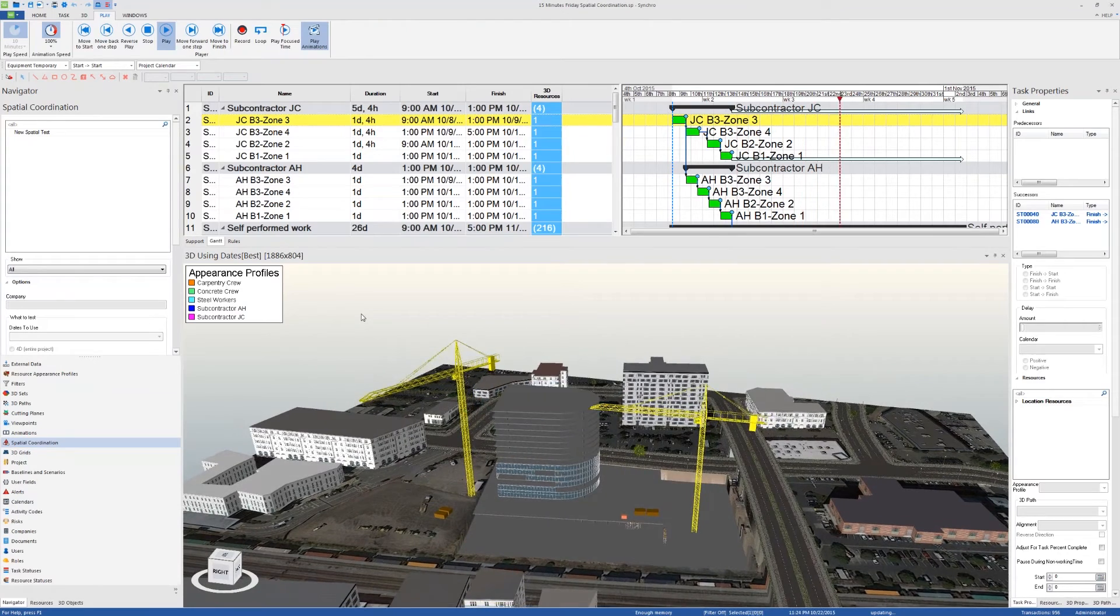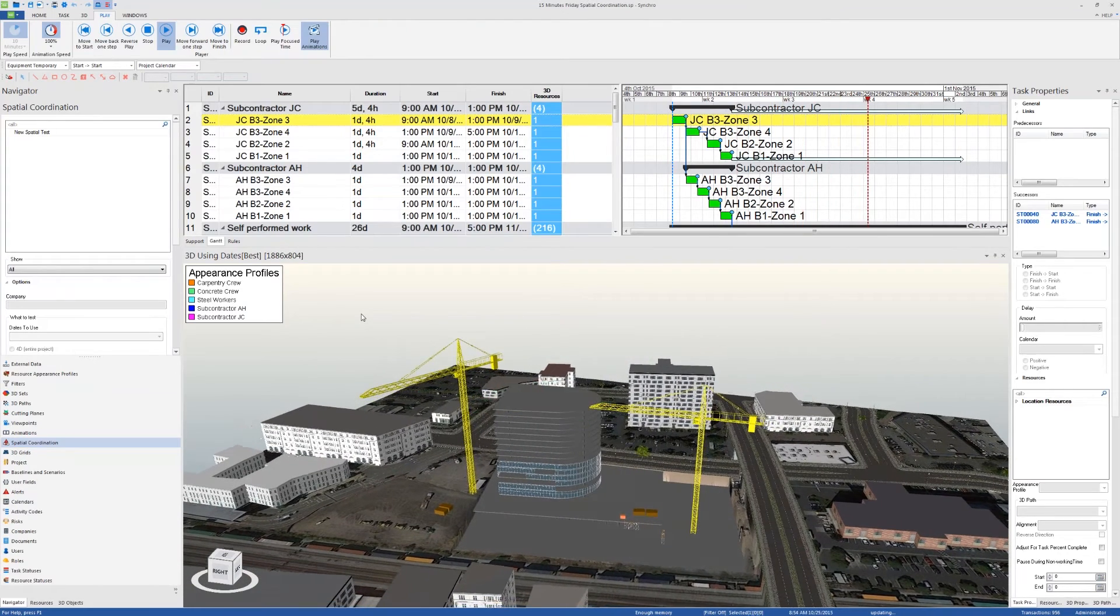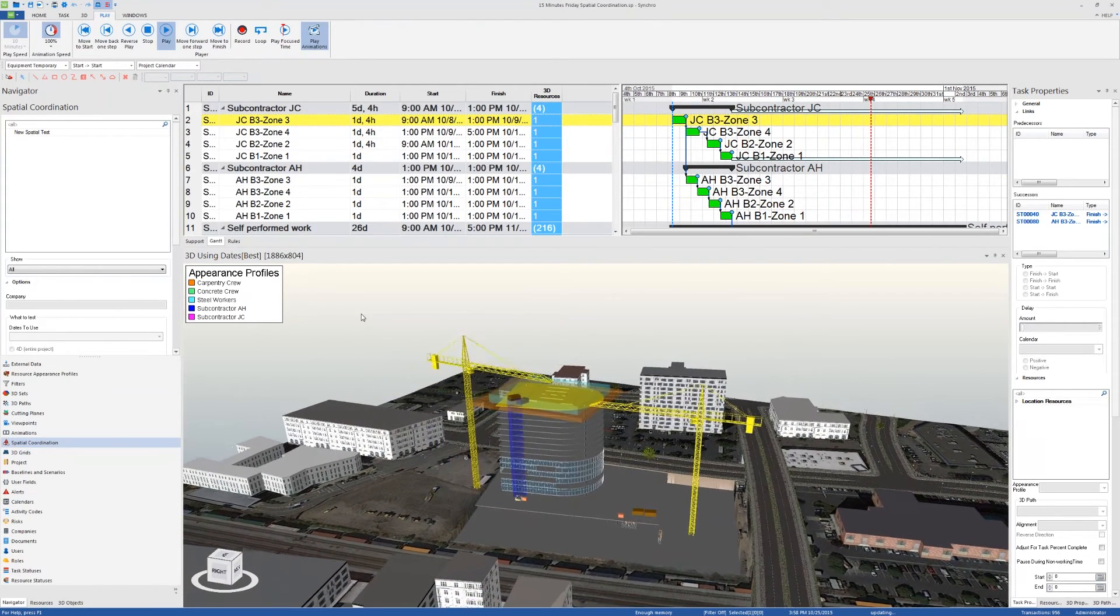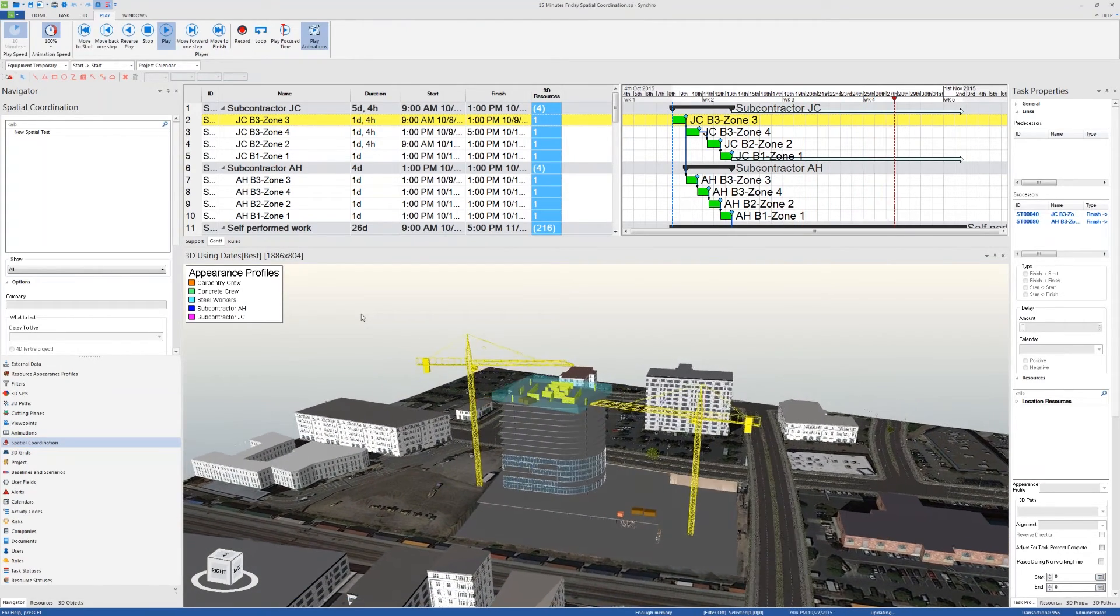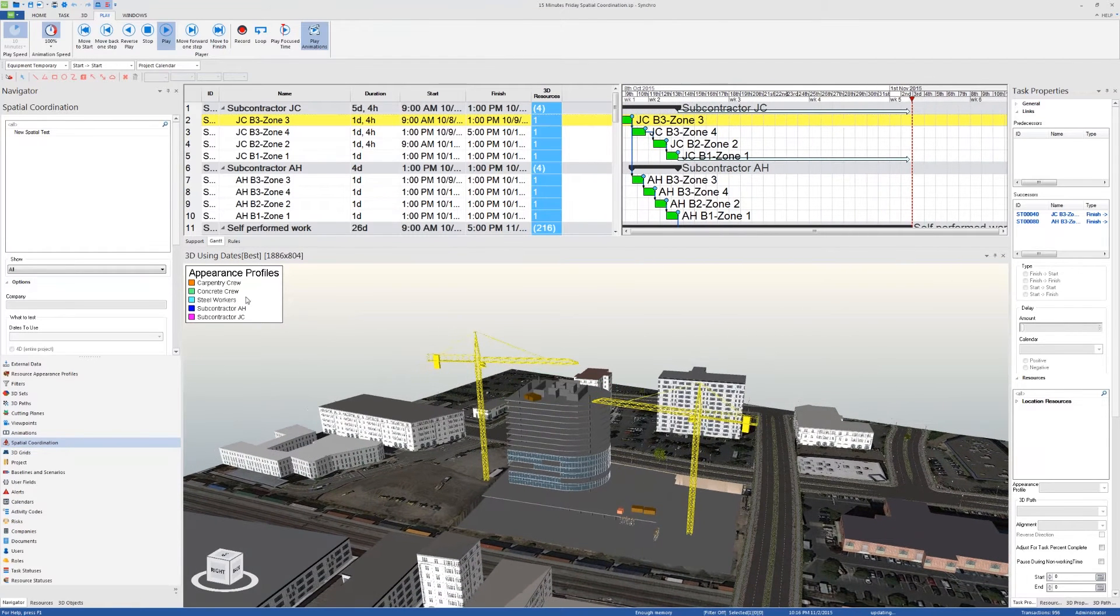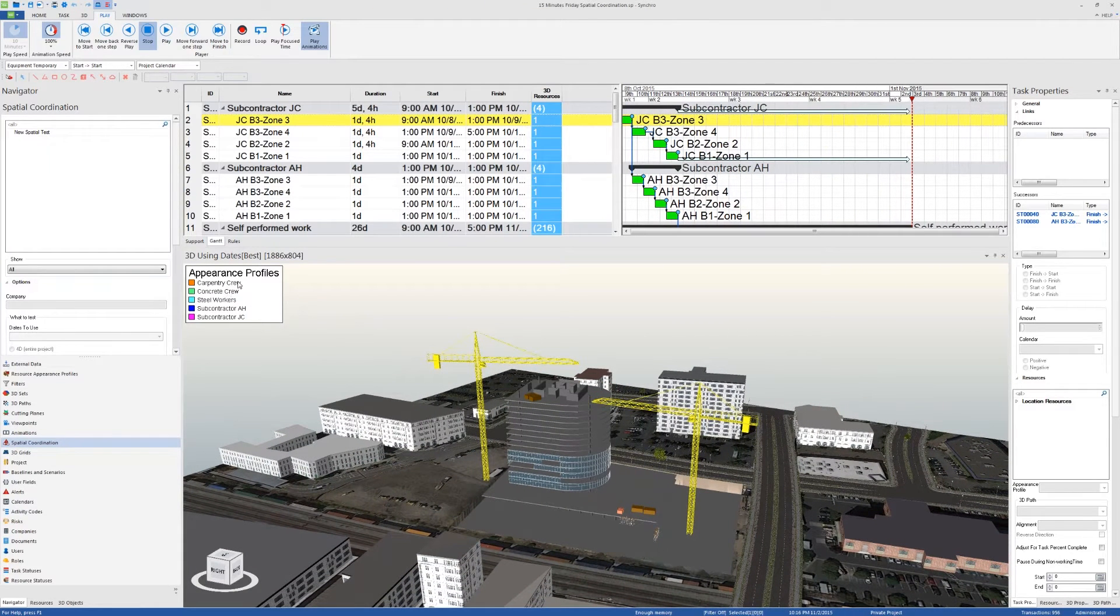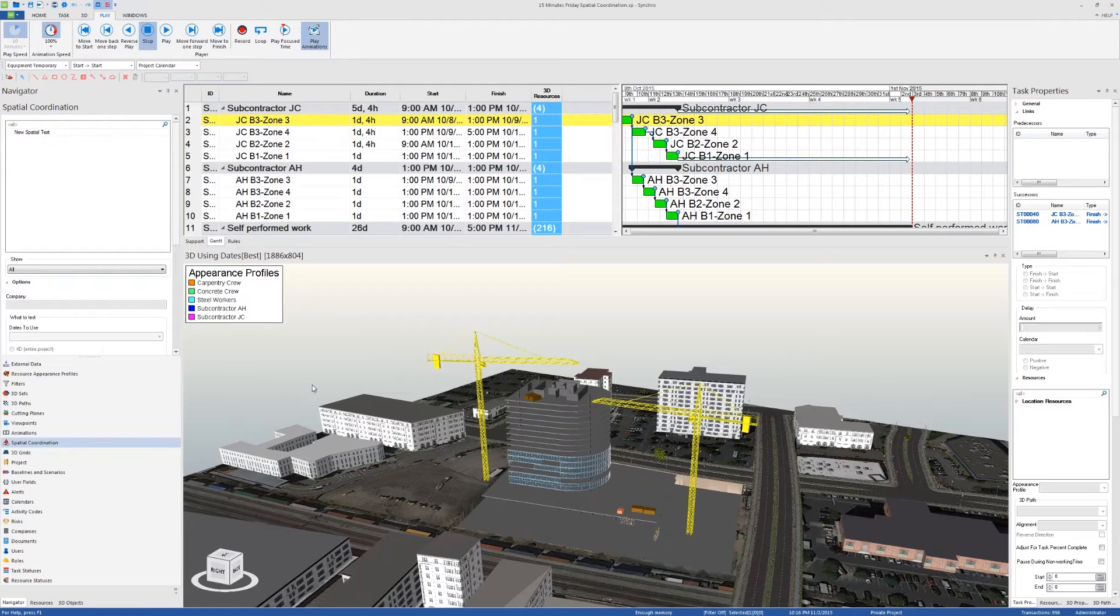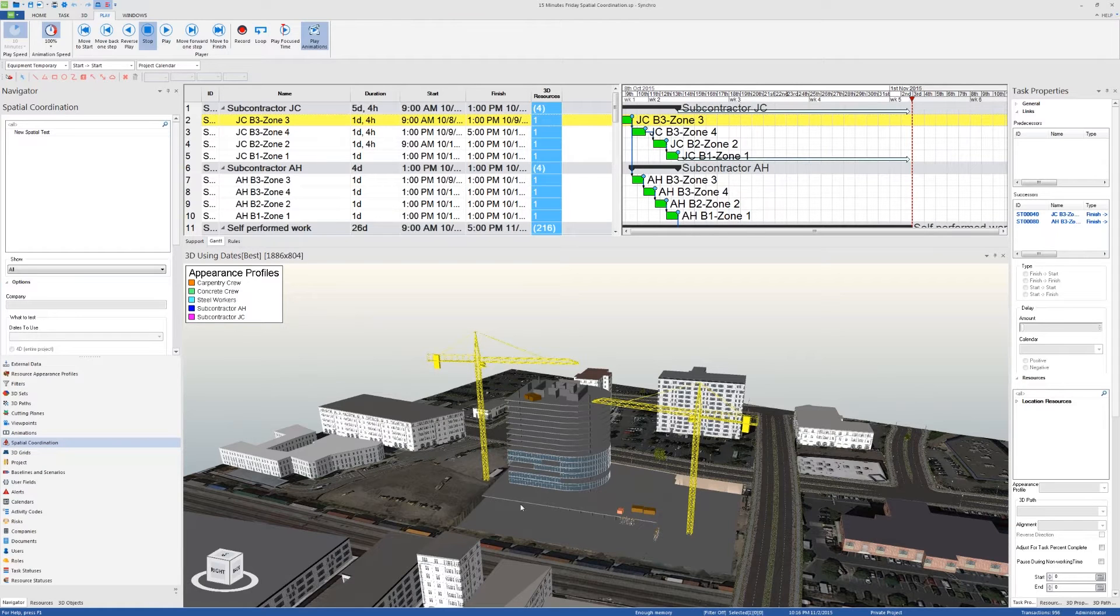As you can see, there are workspaces popping up in the schedule. The way I've set up these workspaces is that I've created appearance profiles for each trade. This way I can assign the same workspace, this 3D object, to different tasks following different appearance profiles that will indicate which trade is working in that place, and then I can visualize the flow of trades throughout the project in that look-ahead plan.